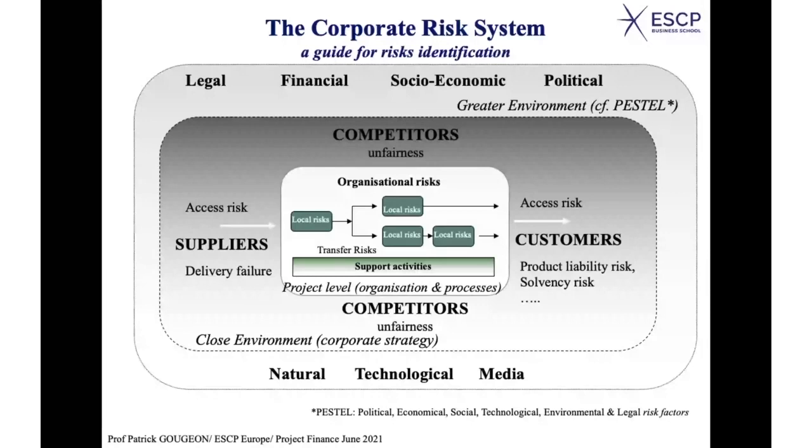What about the risk of a tsunami? Look at Fukushima in Japan. What about the risk of an earthquake? If you want to develop a nuclear plant in particular, you better make sure that the frequency and the likelihood of an earthquake is not too high. So natural elements are more and more important, and you have no control on them indeed. You have no control on earthquakes typically.